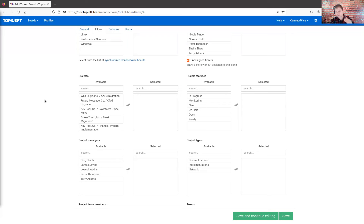So then we go to the columns tab, and this is the interesting part. This is where we get to define what are the key stages of the lifecycle of whatever ticket we are showing here. I can click 'Add Column' a couple of times and we'll get a few more choices, and then we can set up our columns. I'm just going to do the simplest possible setup: to-do, doing, and done. I'll give them those names in the columns.